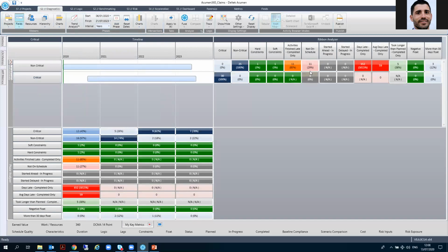And as we said during the presentation, these 11 activities were not on schedule. Sorry, that were not on schedule. They were all non-critical. So if we're only focusing on critical activities, we will lose visibility of what is happening below our feet and potentially will emerge or explode at some point. So this is just another way to present the information.